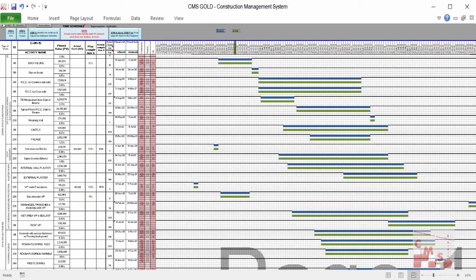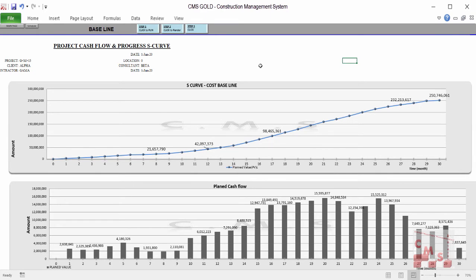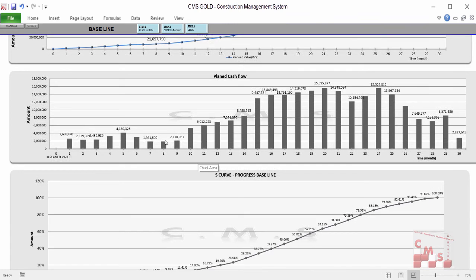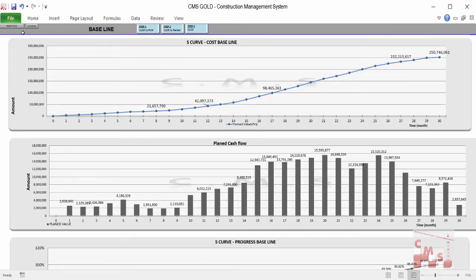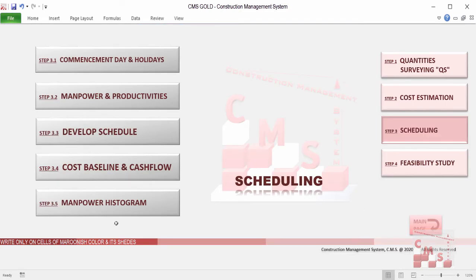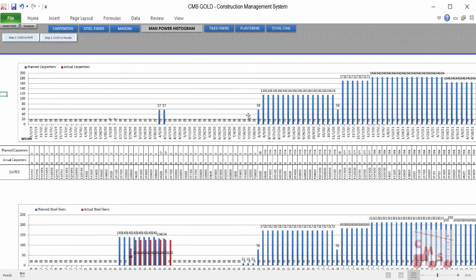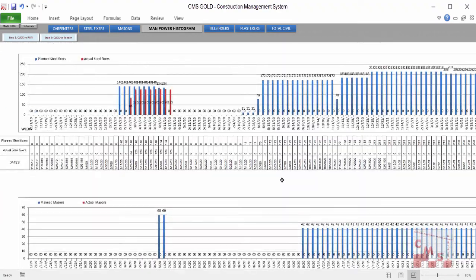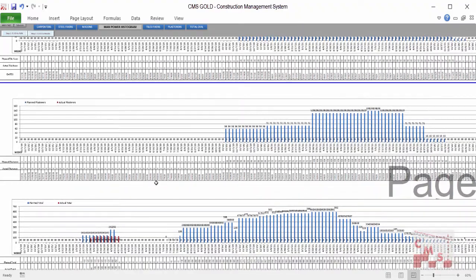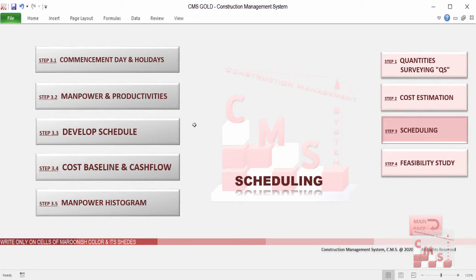Of course, you can modify your time schedule according to your project constraints as shown in the course. After developing the schedule, CMS will automatically produce a cost baseline and monthly cash flow indicating the required cash flow at peak and for every month, and the percentage of progress required every month. Furthermore, CMS will produce the required manpower histogram, allowing you to know from the beginning what manpower is required — carpenters, steel fixers, masons, tile fixers, plasterers, and total civil manpower — with a full histogram for the amount and timing of deploying them, and the company capacity required for this project.